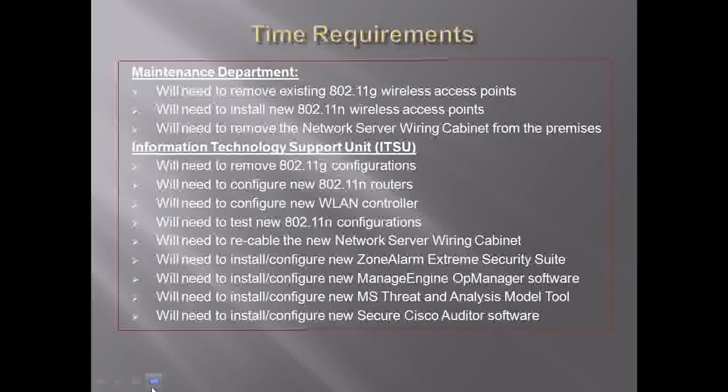I feel the new wireless access points can be installed in one day's time as long as the maintenance department and the information technology support unit can perform their relative operations on the same day. However, it may take up to 2 weeks to recable the new network server wiring cabinet and install and configure the new software that will be used.